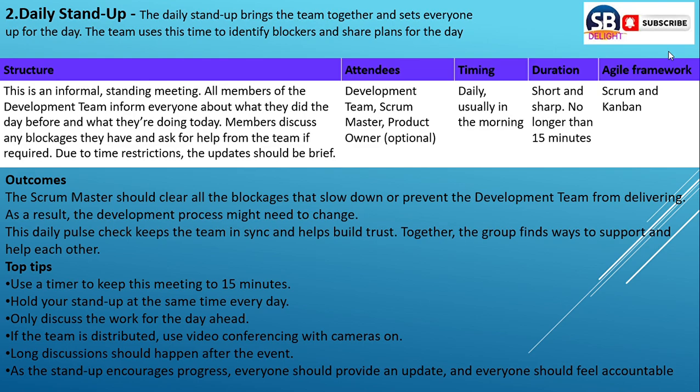Top tips means use the time to keep these meetings to 15 minutes. Hold your stand-up at the same time every day. Only discuss the work for the day ahead. If the team is distributed, use video conference with cameras on. Long discussions should happen after the event. As the stand-up encourages progress, everyone should provide an update and everyone should feel accountable.